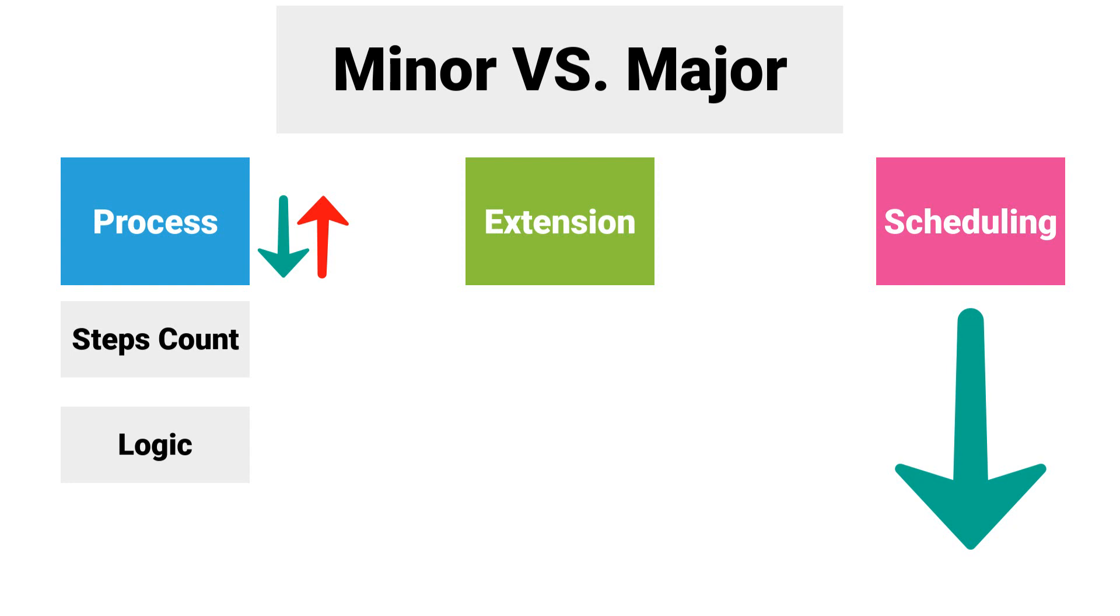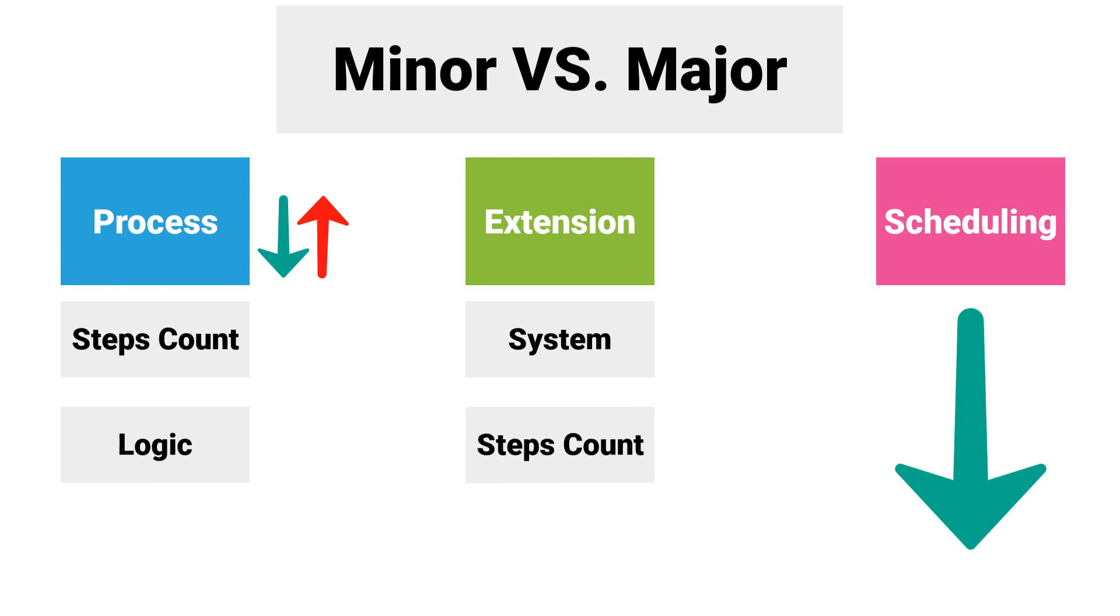In the case of add extension, it must first be checked whether the new steps are being carried out in the same system where the original process is being carried out, or whether it is a new system. After that, it should be checked how many steps should be implemented, and then the logic should be checked to see how complicated this is.